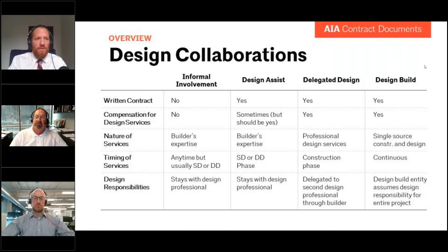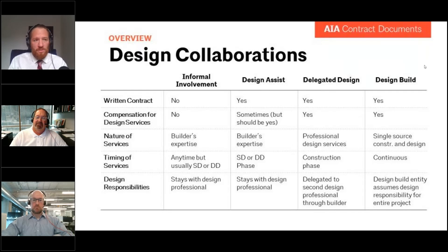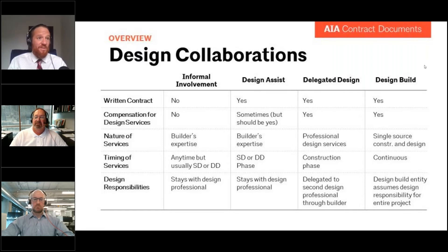It's really about bringing some consistency to this area. From a practical perspective, these were documents that folks would regularly call in and ask us for, so eventually we decided we should make them. These concepts are already embedded in our existing documents — if you look at A201, there is a provision in Article 3 that is clearly a delegated design provision, setting out a process for the contractor to hire a design professional to do delegated design work. A lot of folks asked if we could give them a contractor-consultant agreement, and we didn't have one until just now.